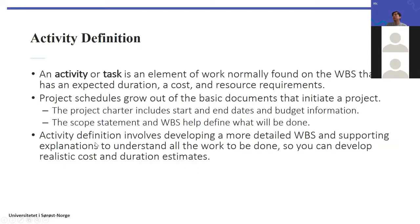For activity definition, the key input is the work breakdown structure. The WBS gives you the structure of tasks and activities of the project, so it is naturally the direct input for scheduling. In scope management you define the structures of work, and in time management you assign durations planned for each of the tasks.